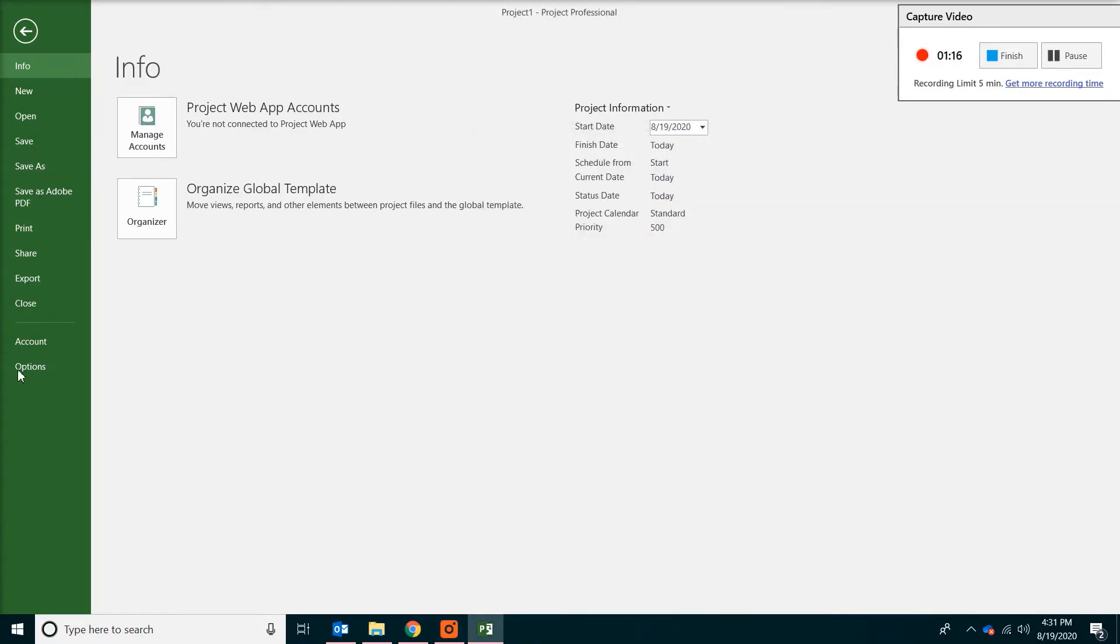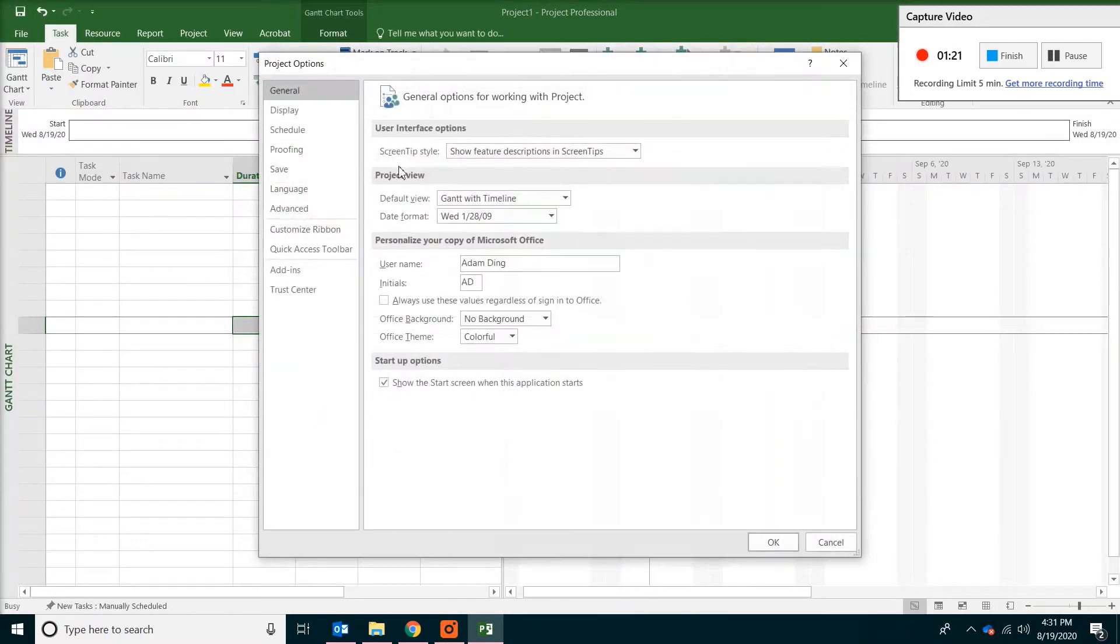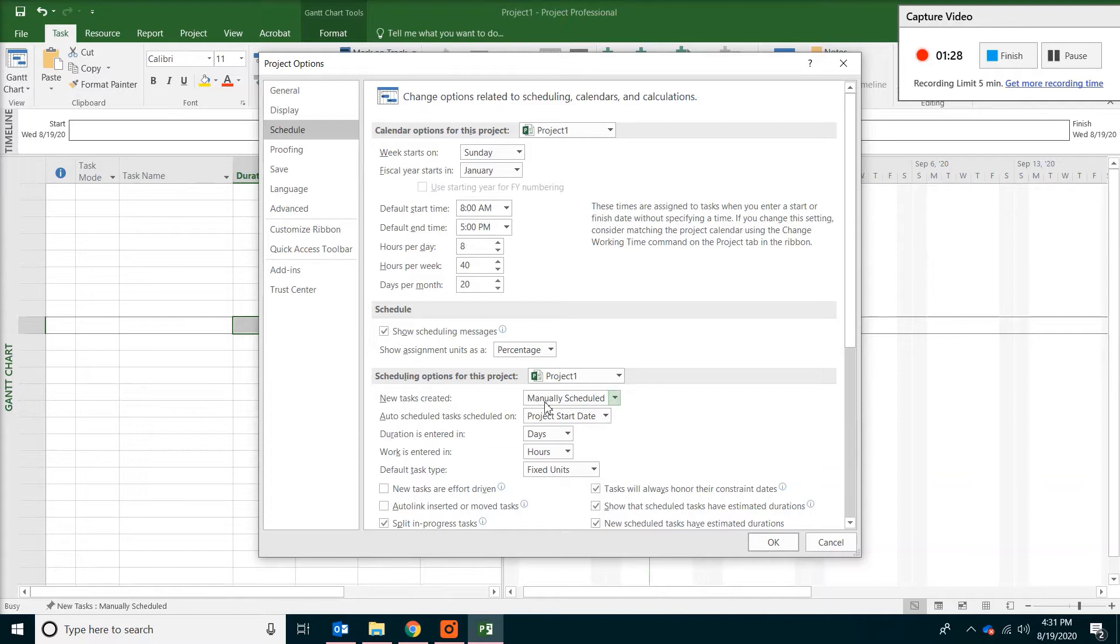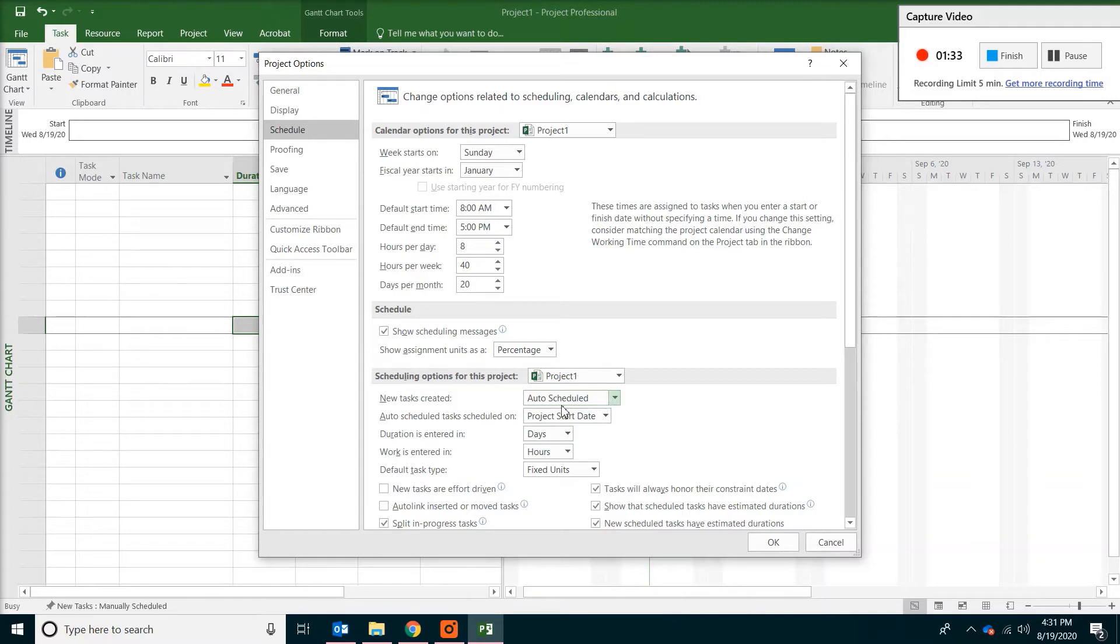The next thing you do is more important. On the left side and click on options. And then go down to schedule. And change new tasks created should be auto-scheduled rather than manual. And then click OK.